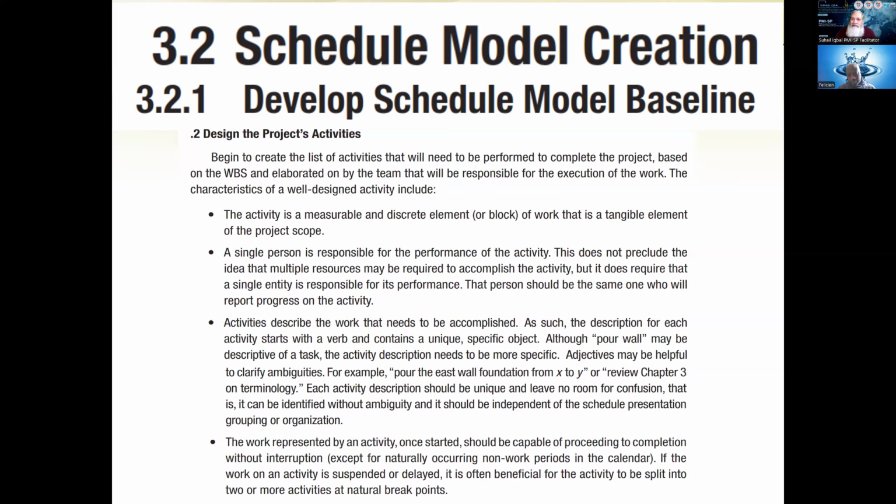For example, there is a shortage of resources. This was a 10 days activity. We have already done 5 days and the remaining work cannot be continued. What should we do? It says break this 10-day activity into two separate activities, one which you have completed and one which will be done later sometime.